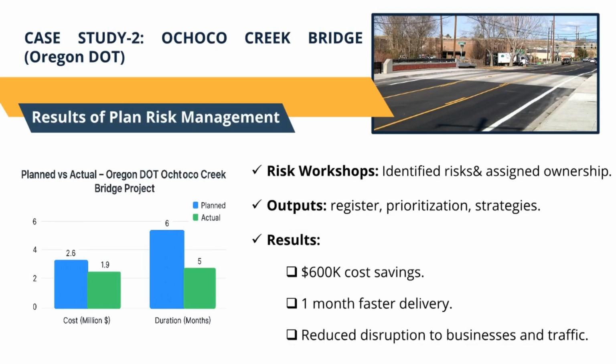Absolutely. The numbers on the chart tell a powerful story of efficiency. They slashed $600,000 from the budget, finishing at $1.9 million instead of the planned $2.6 million. They gave the community its bridge back a full month early, completing in just 5 months.